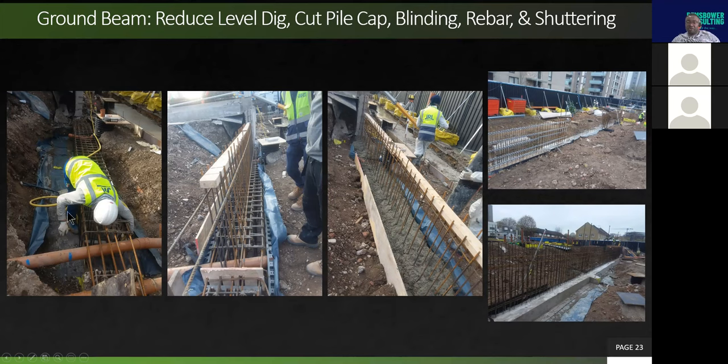On top of it, you now install your rebar cage again. You can see the cage build-up there. You can see again there are services passing through these rebars. So if there are services to go through them, please ensure they are installed. Then, on picture 2, you can see that your formwork is there, and then you've backfilled against that formwork before you pour your concrete.